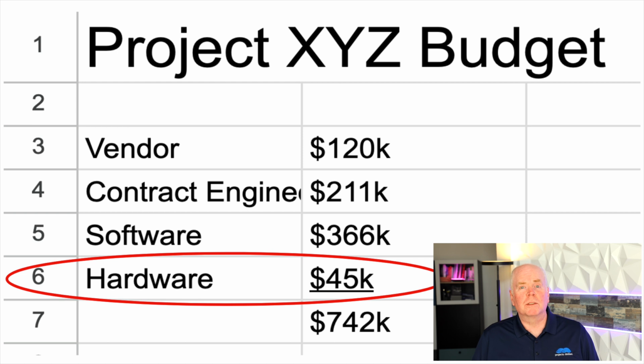The last 2 organizations that I've been with had almost no hardware costs. They were all virtual. But I know a lot of organizations still have those, so we're going to assume that's some server cost and some maintenance. But the cost for the servers can be capitalized. Probably, depending on the rules, but for this scenario, we're assuming that it can be capitalized.